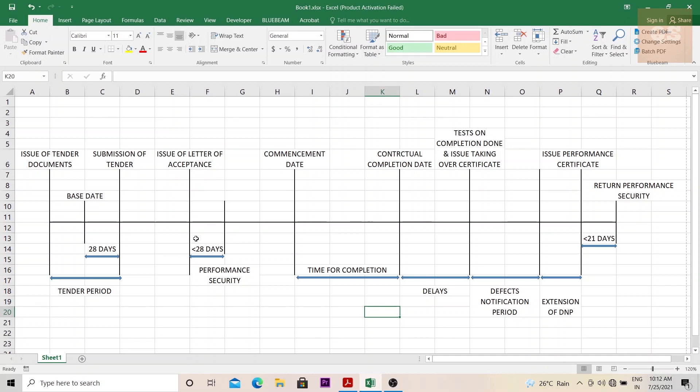Once contractor A receives this letter of acceptance, within 28 days, a performance security needs to be submitted to the employer. I have explained what performance security is in another video, the link to which is being shown at the top right corner. You can click on it and understand what performance security is. So before 28 days, this performance security needs to be submitted.